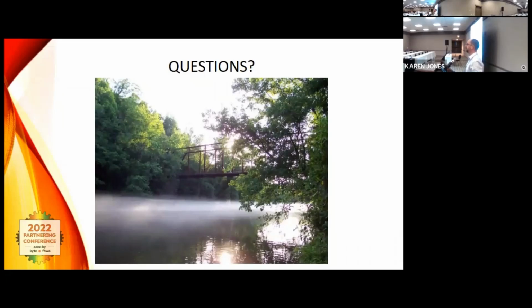We're dealing with updating a permit now for 127, a massive project down around the lake. And we've already paid mitigation for the northern and southern sections. Southern section is not even constructed yet. So we did have to pay millions of dollars years ago for a section that wasn't ready then, but now we're ready to send it out. So we don't have that mitigation cost. It's already been paid.